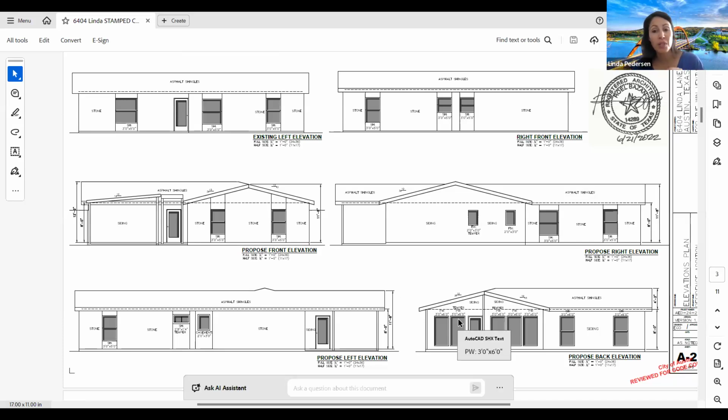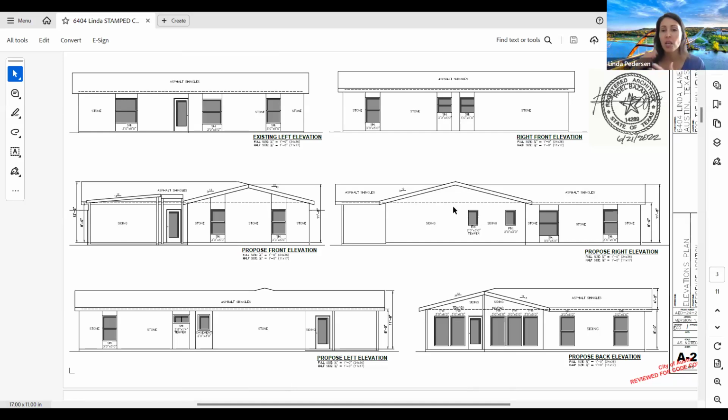I will tell you that one thing we do now, and we kind of did it on this house as well, is given the lead times on materials, we will literally go see what's in stock and make the house to that. If you're doing super high-end custom, yeah, you're going to want fancy windows and beautiful designs. Just know that they may take 6 weeks, 6 months to install. So pay attention when you're designing to your material lead times and availability and pricing as you design.